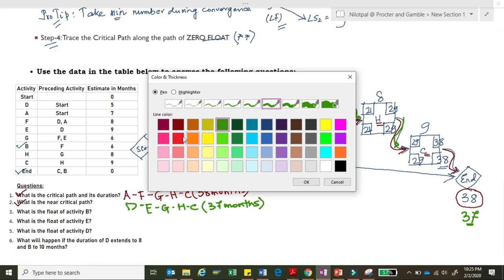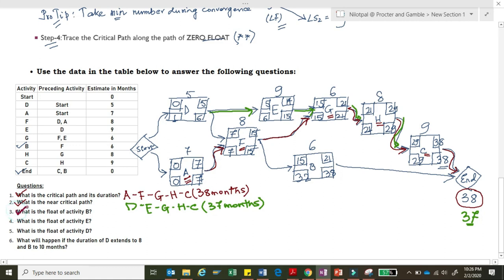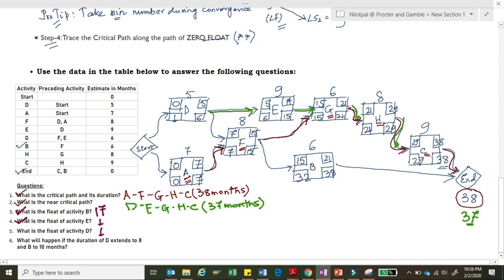Float of activity B: Late Start minus Early Start = 32 minus 15 = 17 months. Float of activity E: 6 minus 5 = 1 month. Float of activity D: 1 minus 0 = 1 month. Activities D, E, and B have buffer, so the project manager can deprioritize them temporarily and focus on the critical path activities A, F, G, H, and C. Questions 4 and 5 are answered.